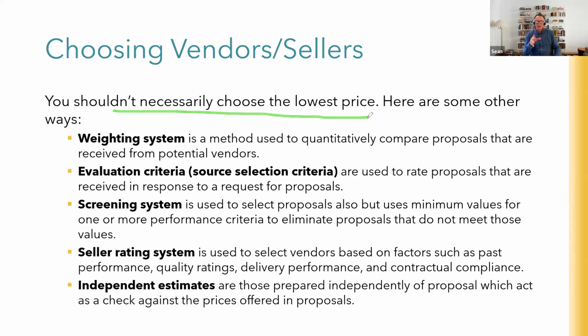There can be some major issues with going for the lowest price. Here are some of the issues. First up, you could find that the person who gave you the lowest price misread everything. Okay, you go, well, that's not my problem. Well, it is your problem, because if they've misread it and you sign them on, then they go out of business because they just can't meet the terms. Then you're a major hit to your project. So make sure the low price truly understood what you're asking for.